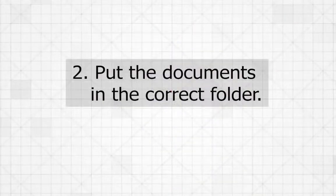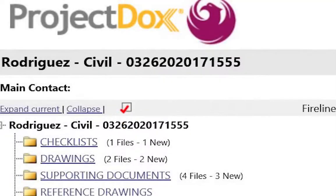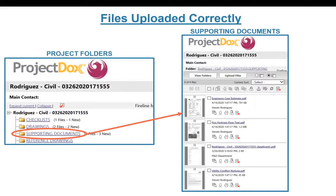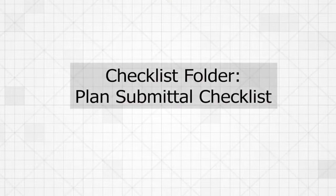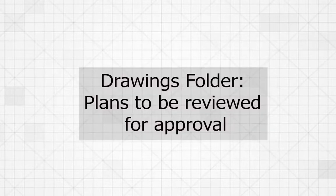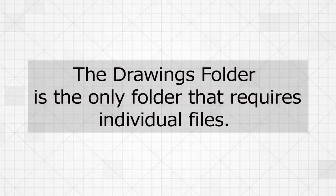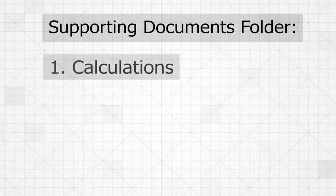Second, put the documents in the right folder. Use the folders that are auto-generated in the system to organize your submittal. Upload your checklists, drawings, supporting documents, and reference drawings in the correct folders. The checklist folder is for your plan submittal checklist. The drawings folder is for plans to be reviewed for approval, and it is the only folder that requires individual files.